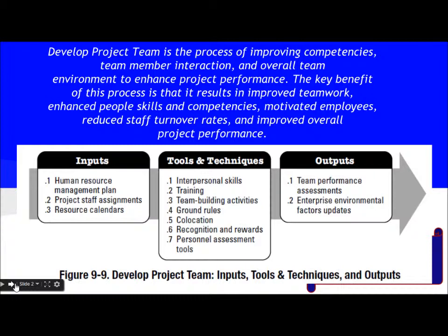The inputs involved are human resource management plan, project staff assignment, and resource calendar. The tools and techniques are interpersonal skills, training, team building activities, ground rules, co-location, recognition and rewards, personal assessment tools, and the outputs are team performance assessment and enterprise environmental factors update.